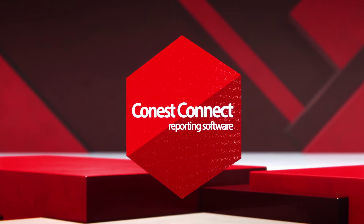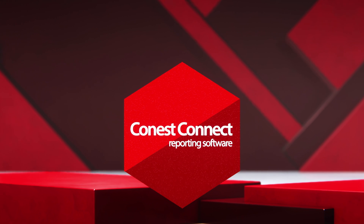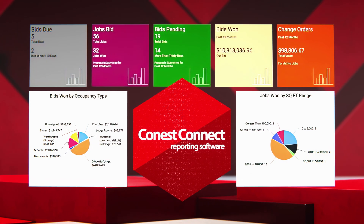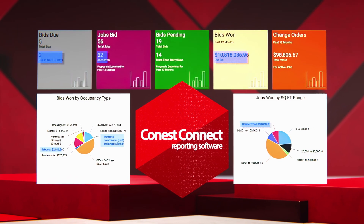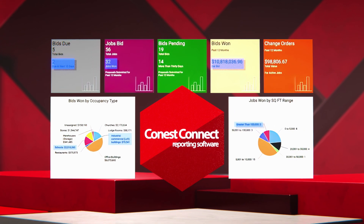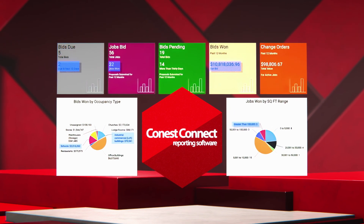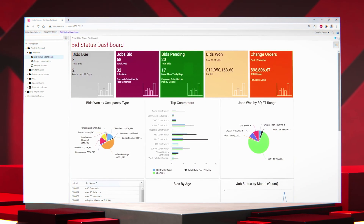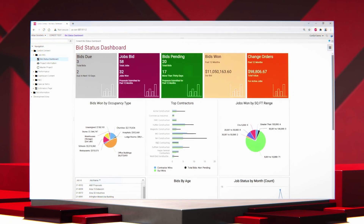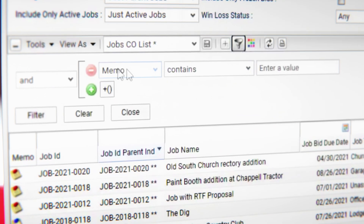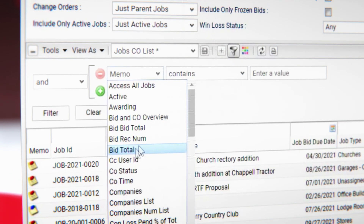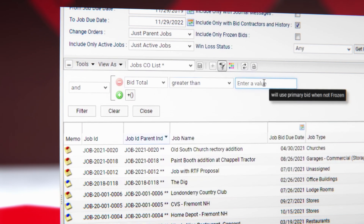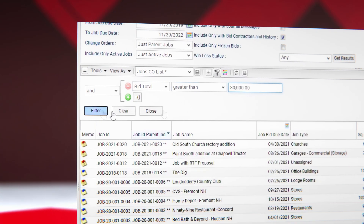Conest Connect helps you create dynamic reports from your IntelliBID data in minutes. Set up custom dashboards to compare common projects. Isolate important details and forecast purchasing and labor requirements for multiple jobs at once. Custom views keep critical metrics at the forefront. Easily determine the most winnable and profitable jobs.